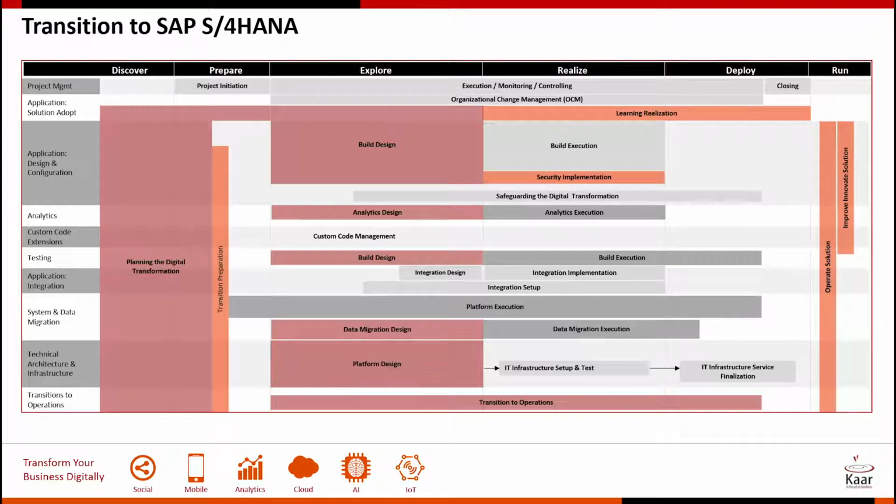From our experience on S4 conversion, we suggest that all open development is saved and the development is overwritten with a copy of production. Some customers think twice about doing it, but from our experience, we understand that when you do this, you accomplish two things. One is post S4, you have your development and ECC, development and quality system as close to your production as possible. And the second one being, each of these mock runs will help you zero in on the downtime and also identify all the problems that you could possibly foresee in production.